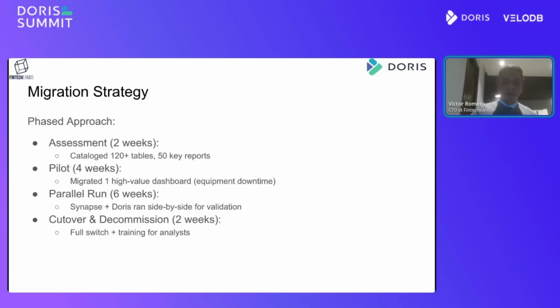Then we had to do a parallel run. We ran Synapse Cloud and Apache Doris side by side in order to do the data validation, the data ingestion, and also gather feedback from the end user. And finally, we did the cutover and the decommission.